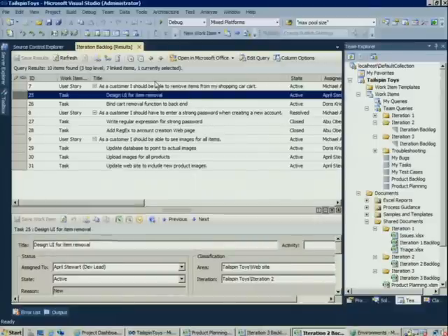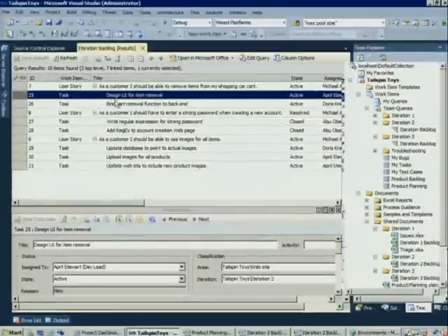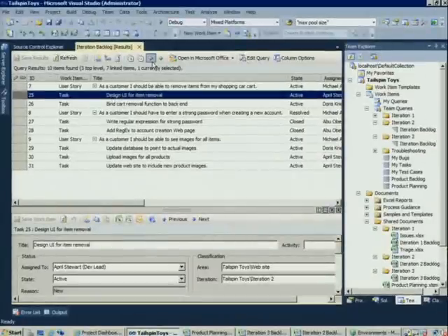So here, up at the top, we have a series of user stories with associated points, but underpinning those are work item tasks that need to be done by my development team. So my development team can concentrate on implementing those tasks, and we can see accruals against them, and then those will roll up into user stories. We can either promote or demote various stories. So we can promote them to a root element, or we can demote them to a child element. We can also do various things with these iterations.